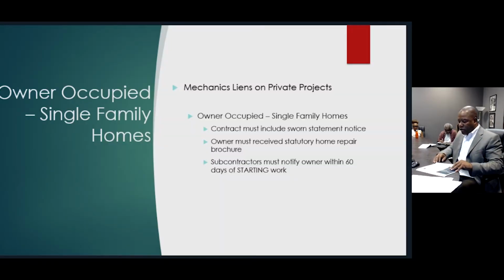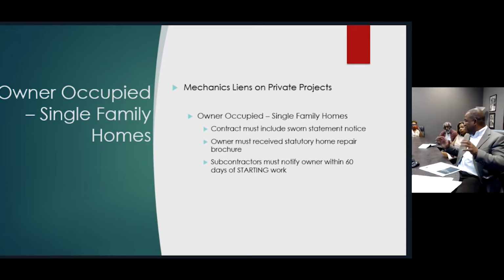Now, I mentioned earlier that we may have some subcontractors performing work on single family owner occupied properties, and they have a special duty and responsibility to provide an owner with information. I typically like to stay away from these things because, admittedly, this pool of contractors typically doesn't comply with the law. They must provide the owner with a sworn statement prior to doing any work, with all the names, duties, and responsibilities of every subcontractor that will be working on the project. They owe that responsibility to the owner.